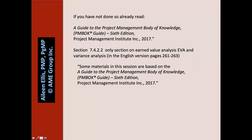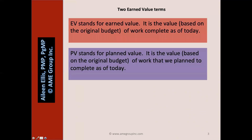In this example, using the terminology of the PMBOK Guide, though earned value has been around for a very long time. When we talk about schedule variance, we need to talk about two earned value terms. EV stands for earned value — it's the value based on the original budget of work complete as of today. A keyword there is 'complete' and the keyword is 'today.' PV stands for planned value — it's the value based on the original budget of work we plan to complete as of today.